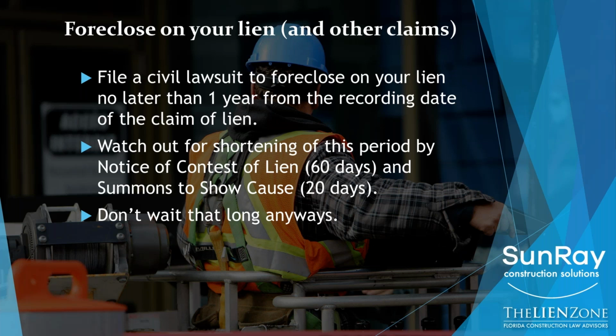I suggest that you don't wait a year anyways. Good collection practice would dictate that within about day 60 of your last work on the job, if you haven't been paid, that's when you need to start having a discussion in your office about putting a lien in place. Do not wait till the 70th, 80th, or 85th day to start the lien process. You should start that process, start discussing and moving that ball forward at about day 60.